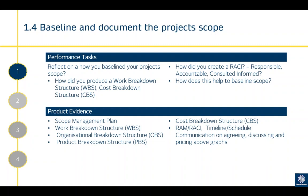Reflect on how you baselined the project scope and how you produced the scope plan. The scope plan will involve a work breakdown structure, an organisational breakdown structure, and combining them into a responsibility assignment matrix. It may also include a product breakdown structure and a cost breakdown structure. These breakdown structures are typically the main components of your scope management plan, though it may differ from organisation to organisation and project to project. Product evidence could be your scope management plan, work breakdown structure, organisational breakdown structure, product breakdown structure, cost breakdown structure, or your RAM/RACI.